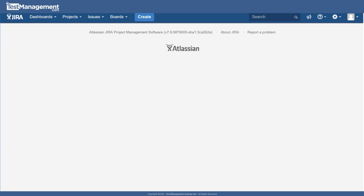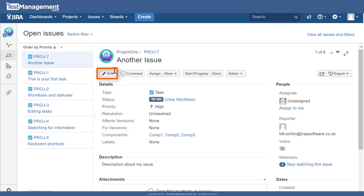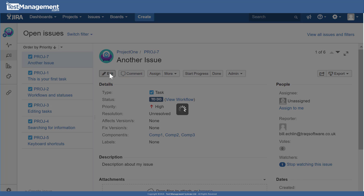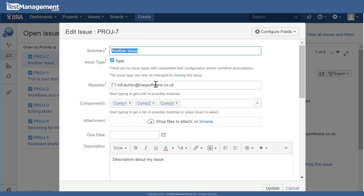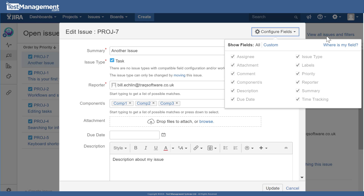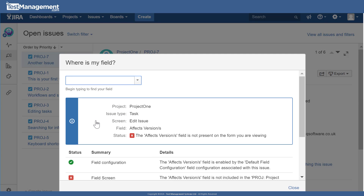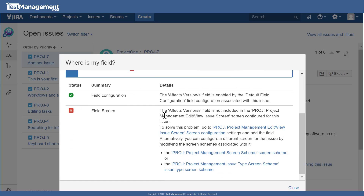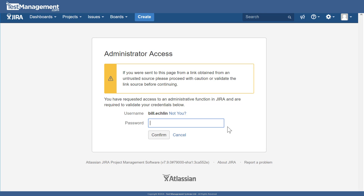Going back to our issue and looking at versions, you'll notice the 'affects version' and 'fixed version' fields. By default these aren't editable, and even in the edit view those version fields may not appear. The quickest fix is to use 'Configure Fields' > 'Where is my field?', type in 'version', select 'affects version,' and Jira will indicate the field isn't on this screen. It directs you to the project management screen where, after entering your password, you can add the affects version and fixed version fields.